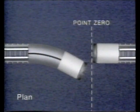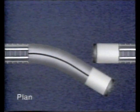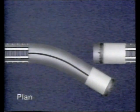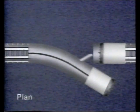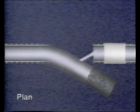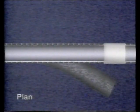Meanwhile, deep under the channel, the English and French TBMs were heading straight for each other. As the cutting heads were larger than the line tunnel behind them, neither could reverse. The English machine was steered downwards until it was clear of the line of the tunnel. Here, at its last resting place, it was later entombed in concrete. The French TBM, which completed the tunnel, was dismantled and taken out piece by piece on the construction trains.